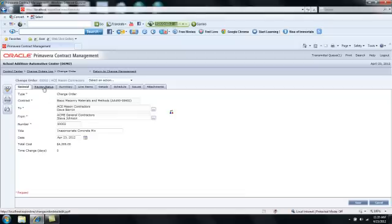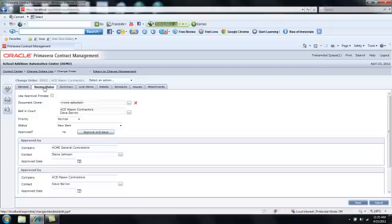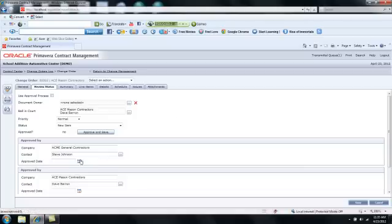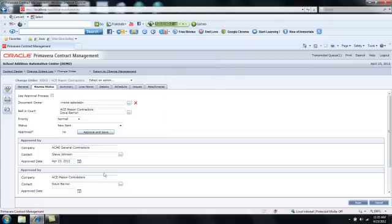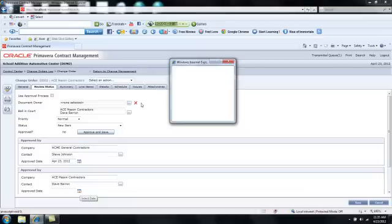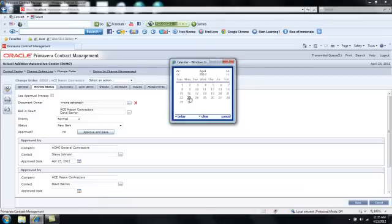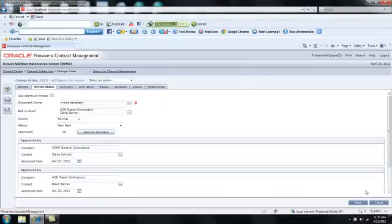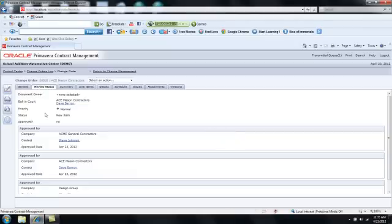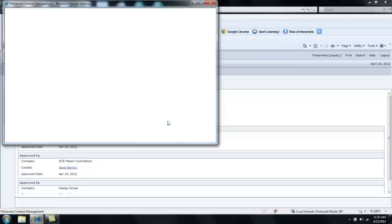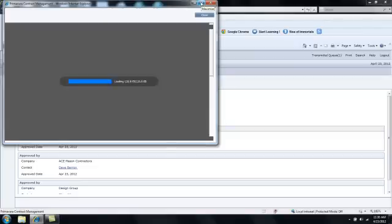And I probably would want to also go through the final approval process here as well so that those dollar amounts would show up on approved commitment changes. So once again, I'll report the dates that we approved this, both myself and Ace Mason. And I'll save. And again, I can come over to the Print Preview or to select an action Advanced Print and pick one of the formats for printing the change order.